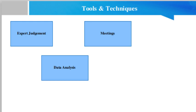Now we shall discuss the tools and techniques for this process. The first one is expert judgment. Expert judgment should be considered from individuals or groups with specialized knowledge or training in the following topics: previous similar projects, information in the industry discipline and application area, cost estimating and budgeting, and earned value management.